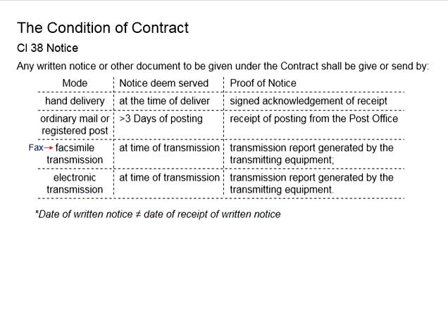As you know, there are some procedures which have a deadline imposed onto certain events. You will have to look into the statement in the PAM contract in order to clearly define the cut-off date, whether it is defined by the date of written notice or the date of receipt of the written notice by the receiver. In most cases, it is referring to the date that the receiver received your written notice.